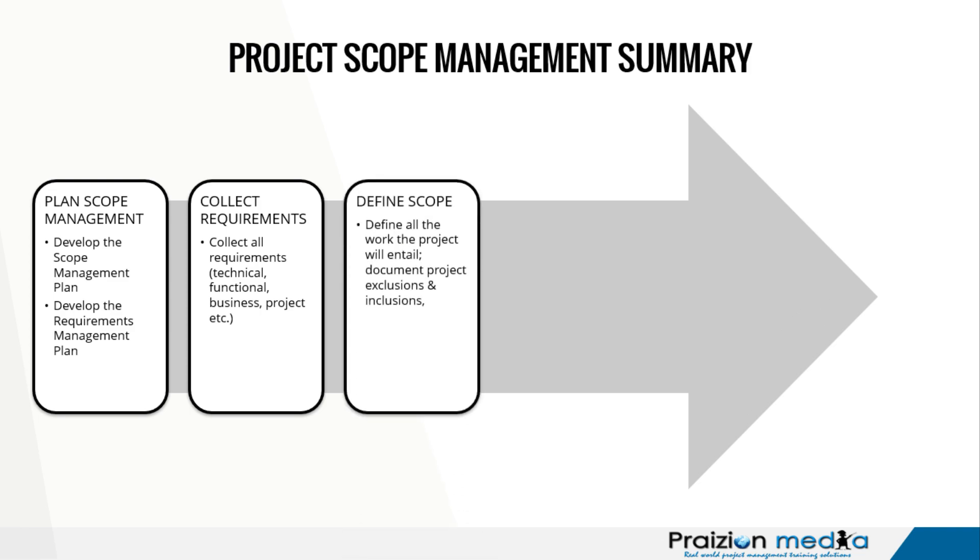The next process is Define Scope — defining all the work the project will entail. How do you know all the work the project will entail? Well, you need to know the requirements. If you don't know the requirements, how are you going to define the scope? That is why Collect Requirements comes first. If someone says they want Orange and Bouncy, what does it take to produce Orange and Bouncy? That may be different than what it takes to make red and flat. Orange and Bouncy, as a requirement, gives birth to the work needed on the project. You know the work when you know the requirements.